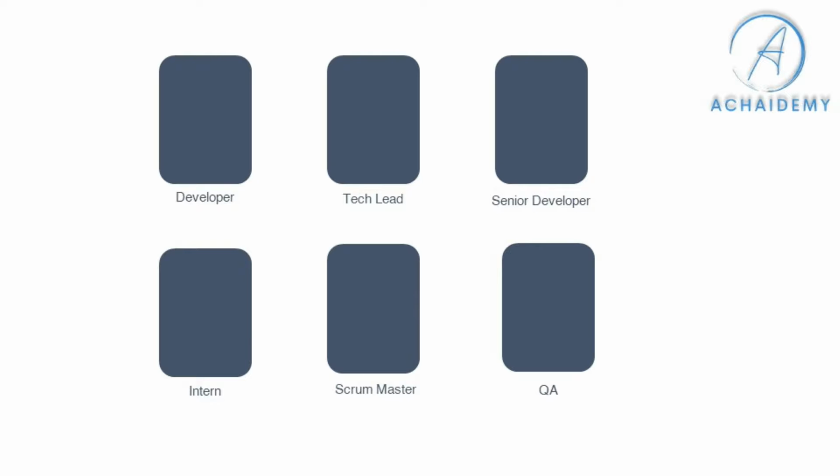And then whether it's a developer, a lead, a senior, even a scrum master or product owner, everybody will put up their efforts. Once everybody understands, for example, a QA may look at the same story from his testing point of view. The QA might feel the story is complex because the impact is more. But for a developer, it might be a small change, while for a QA, he needs to revalidate the complete module. So the complexity of the story varies depending on who is looking at it and which role they are from.